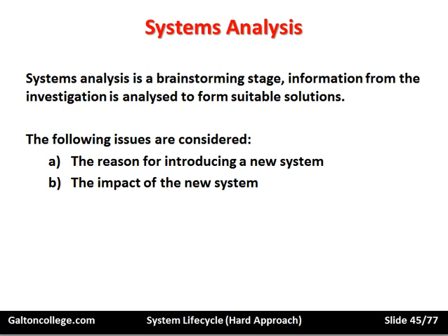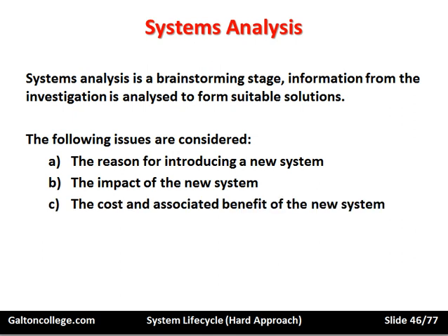So look at the impact a new system will have. Look at the costs and associated benefits of the new system. Changing from one system to another is not costless. The old system has to be dismantled, the new one put in place. That's a cost. And then will the savings from that expenditure justify changing the system? The benefits must be greater than the costs for something to happen.